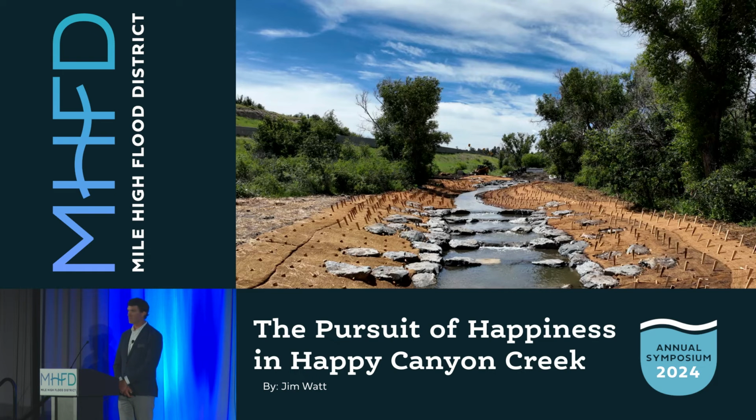So here is the install of some of the quarry mat blanket that we have on our project. We use this material right after construction to stabilize the creek banks and provide a way to lock in the seed bank and give that seed a chance to sprout. As you can see by those wooden stakes poking up in the ground, crews are going to come in on this day and hammer each and every one of those stakes in the ground. So it's a very labor-intensive and costly effort. But I don't think I've ever had a drainageway project where we didn't use this material. It's a must-have for drainage projects.